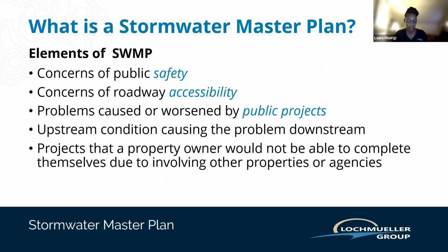Second, accessibility. This usually deals with accessibility to, for example, emergency services such as hospitals, or if there is some evacuation route that might be blocked because of a downed tree or flooding on a street, or even access for police vehicles or emergency vehicles to be able to go to homes and provide services to the residents. School buses as well. For example, if you are within a school bus route, but the road is often flooded during floods, that becomes something that needs to be addressed.